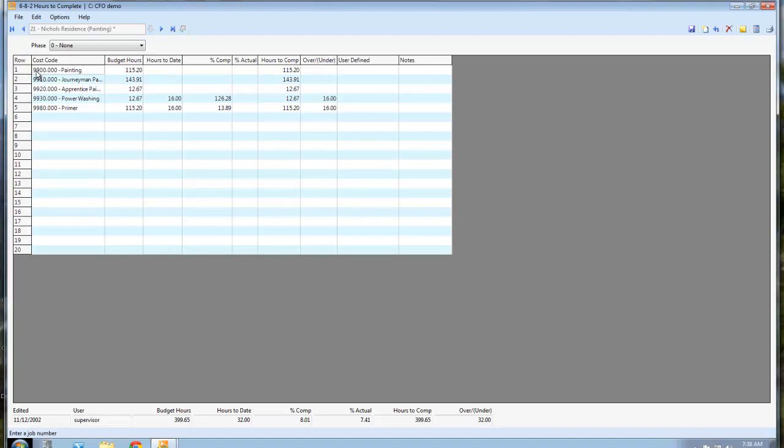So put your task in here. Pull wire, rough in maybe, or whatever you're doing. You'd have the tasks that you do on a normal day-to-day basis. These are the hours that you had in your budget. These are the hours that are coming through payroll.